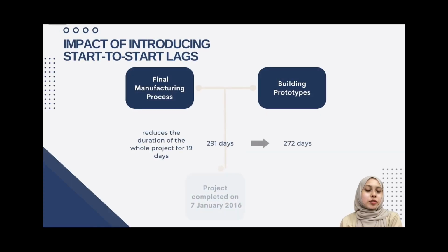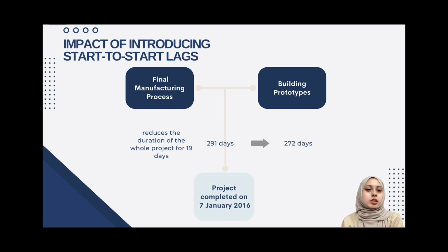Before that, my name is Yusof and I'll proceed with the latest schedule of the deadline with minimum additional resource usage for the project. The impact of introducing start-to-start lag on the building prototypes and final manufacturing process activities causes the project to be completed on 7 January 2016, which reduced the duration of the whole project from 291 days to 272 days. The budget in the project has no changes since the resource is constrained.